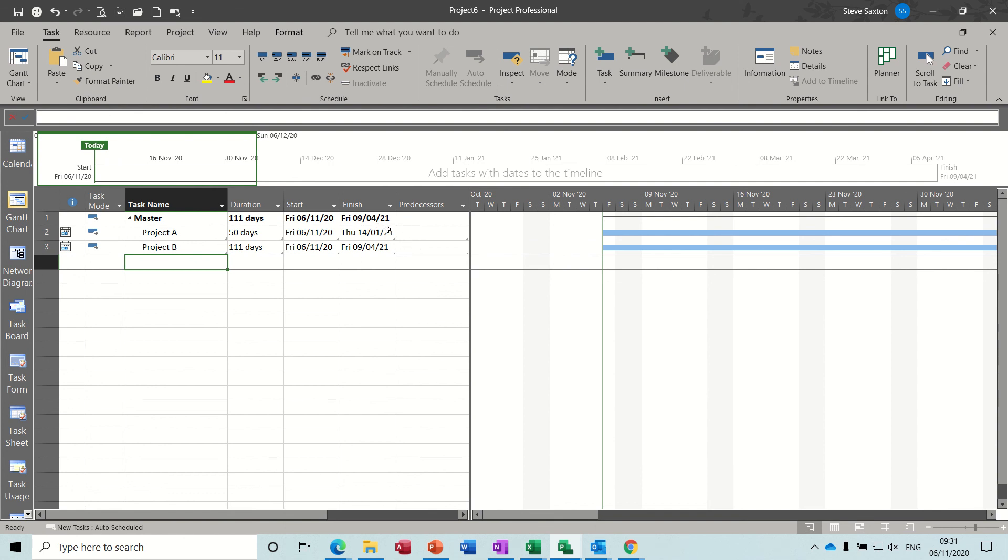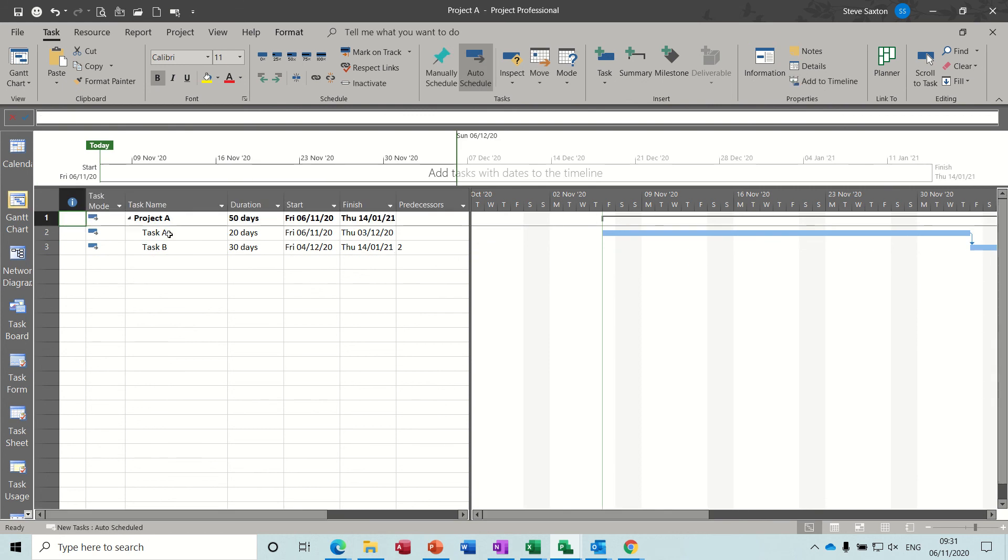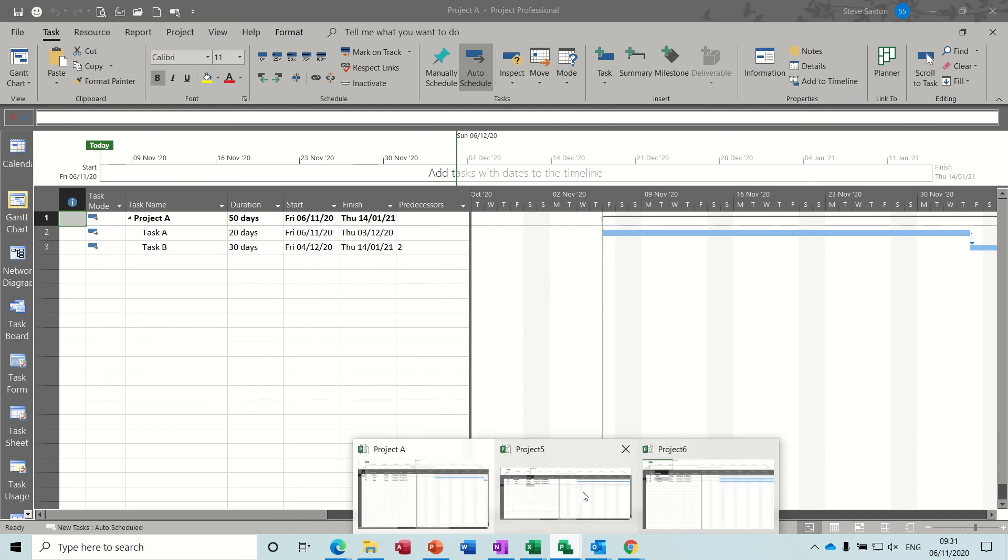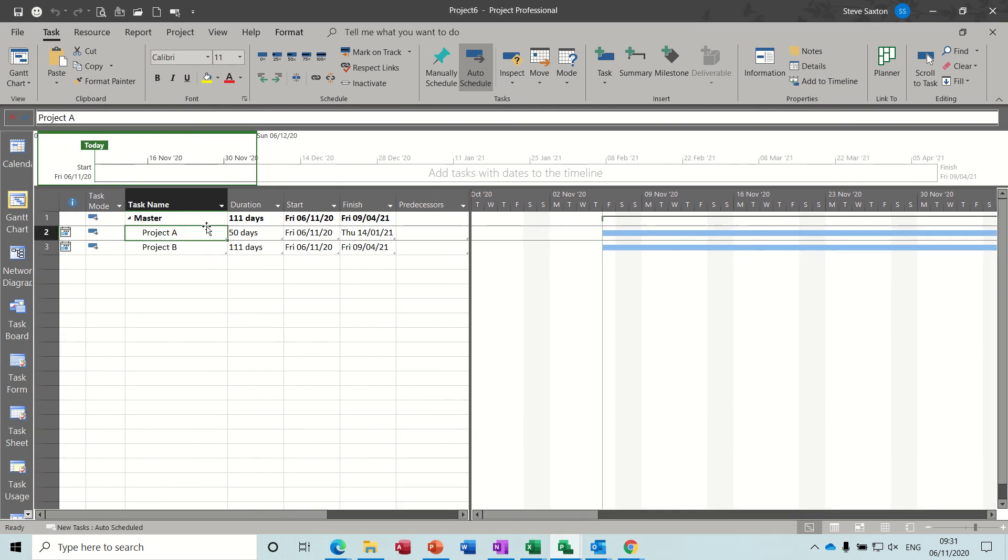And again, you can just follow these on as well. So that's a slightly easier way, I think, to bring specific rows of information in from a large project. You might just want a few rows. Key reporting lines. And you can also do this. If I double click on project A. It actually goes into project A anyhow. So you get the benefit of going into the source file by just double clicking. And you haven't got all the information sitting in the master file. So it doesn't clutter you up.